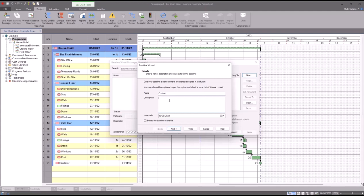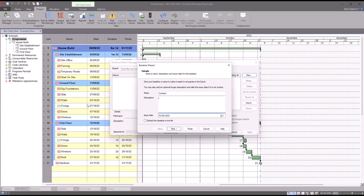Optionally I can put in a description, but this tick box here, this is quite important to take note of. I can optionally embed the baseline in the live file. What that means in practice is your project file, so this file data that's going on in the background here, that's a file on my C drive and that might be, for example, four megabytes in size.